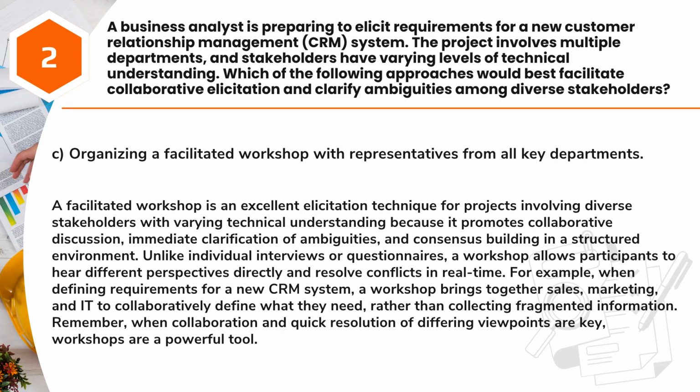Answer: C. Organizing a facilitated workshop with representatives from all key departments. A facilitated workshop is an excellent elicitation technique for projects involving diverse stakeholders with varying technical understanding because it promotes collaborative discussion, immediate clarification of ambiguities, and consensus building in a structured environment. Unlike individual interviews or questionnaires, a workshop allows participants to hear different perspectives directly and resolve conflicts in real time.